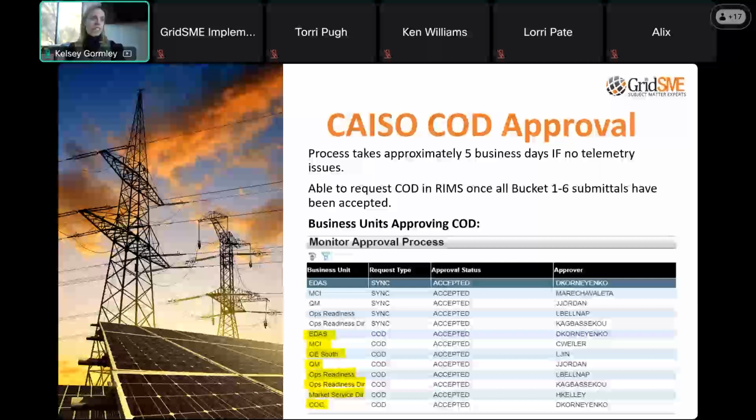That documentation is intended to reflect that all of your meter documentation has been reviewed and is considered complete for your CAISO metering scheme. What documentation does that include? It includes a single line diagram, a 3-line diagram. It includes meter config forms. It includes a metering overview in some cases. It includes completed MSVS forms and a POR calc. And a COM block.